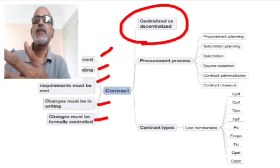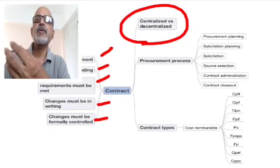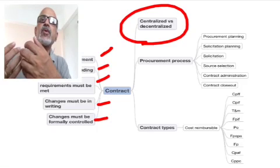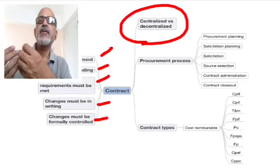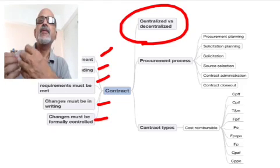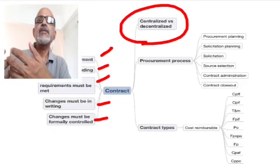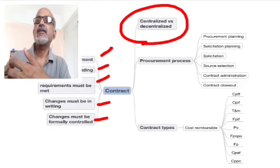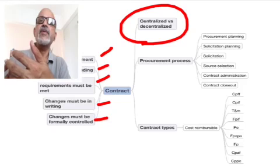In centralized contracting, the contract personnel cater to multiple projects, so your project may not get sole attention. Whereas in decentralized contracting, the contracting personnel is committed full-time to your project, meaning it gets top priority. These are some of the pros and cons, and this is a major decision one has to take during planning procurements.